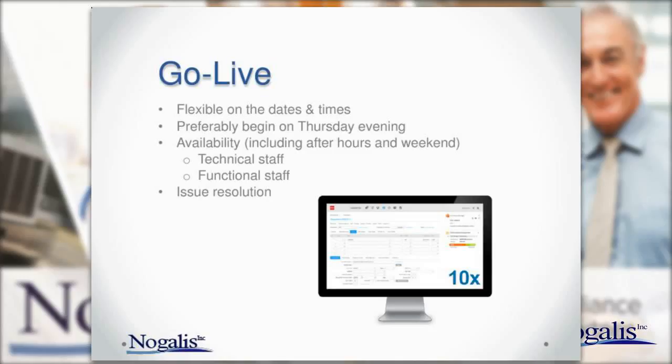And then we've done another upgrade, a recent one, where the customer decided since they didn't use IPA for anything, they did not need a landmark install. So that cut down their upgrade time by quite a bit. So I fully believe it's possible.